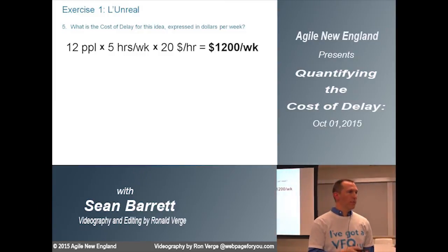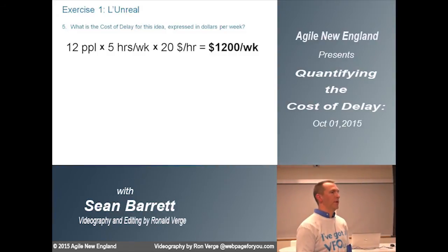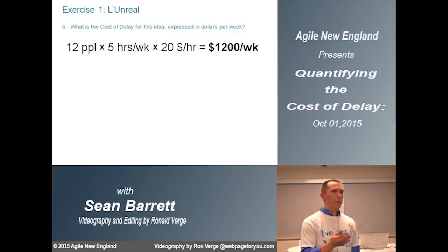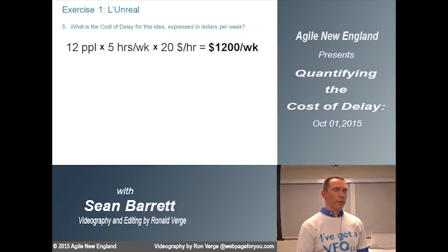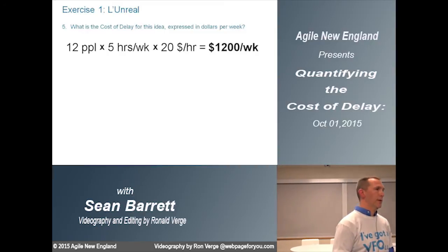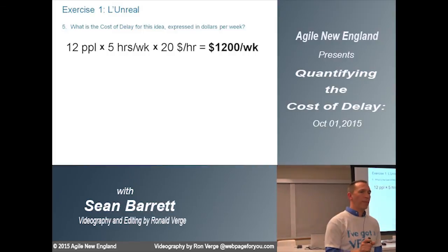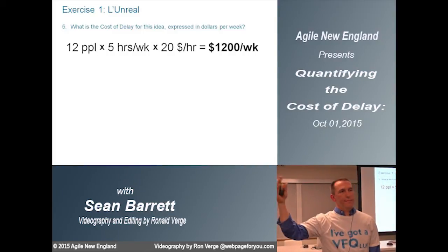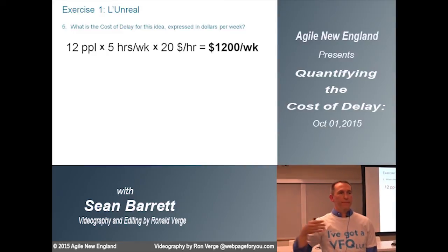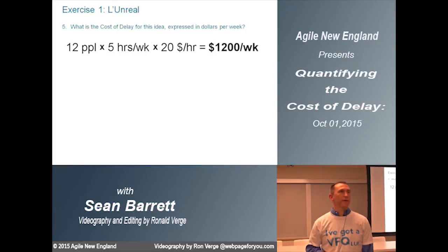Do you really want to put me off for a week before I can talk to you to get a decision from you, Mr. Executive, about whether we should go path A or path B? Because that's actually going to cost us $20,000. It really changes the tone of the conversation when you're able to start talking numbers and put something on a time frame that means something to people. If you start talking about a year long out, it's just a little too easy to ignore it. You talk about this week and how we can change something, that grabs people's attention in a hurry.